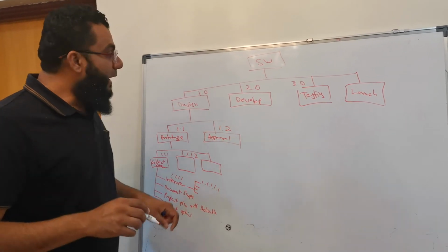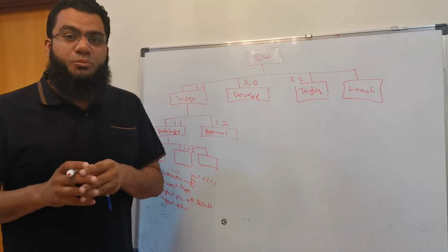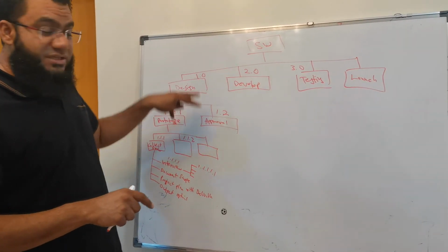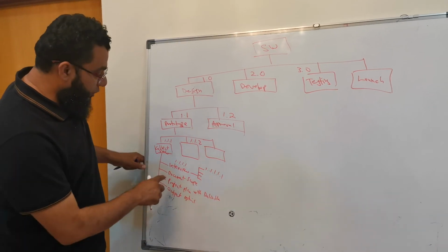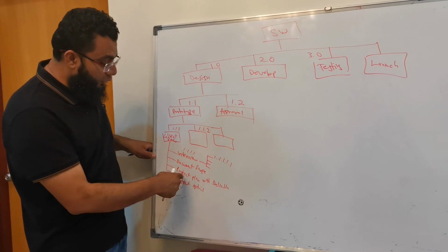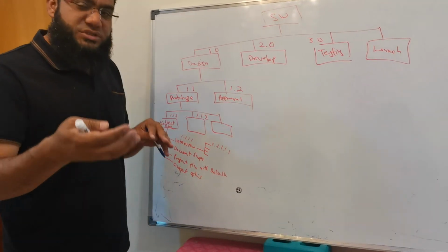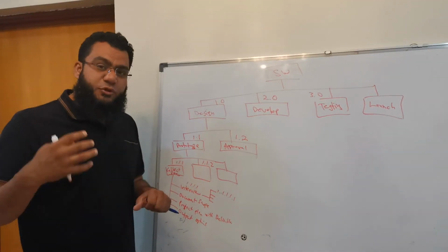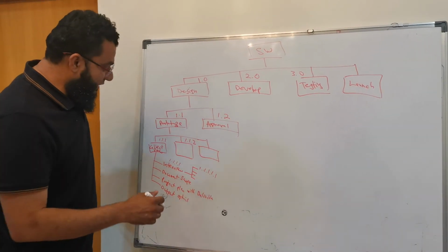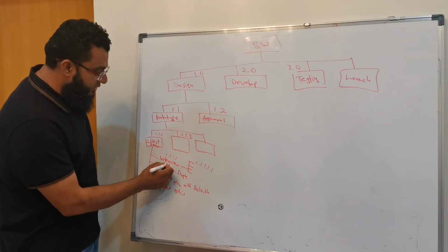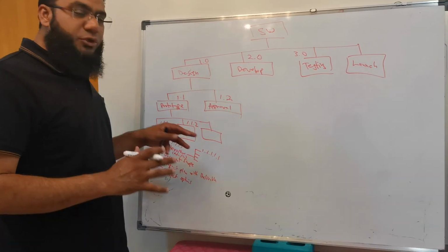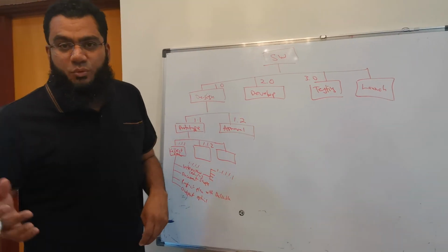Now what I'm doing is actually working on multiple processes at the same time. I create the WBS, I define activities, and I also sequence activities. The way I'm going to do it, the interview is the first thing, then I will document the scope, then I will do the project plan deliverables. So this is a sequence. Further, if you want, you can also work out the resources required. I can even mention in brackets that Adnan is going to work on this and Ibrahim on that. It's up to you how clean you want your WBS and how much detail you want to put in there.